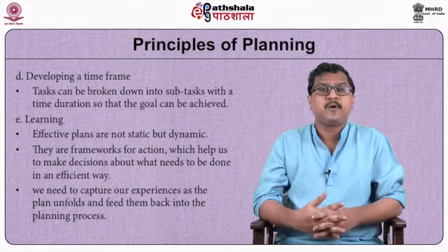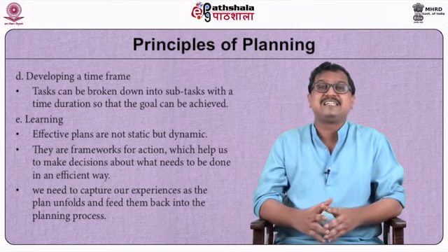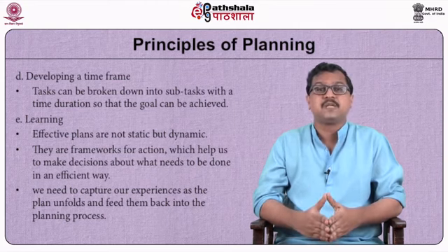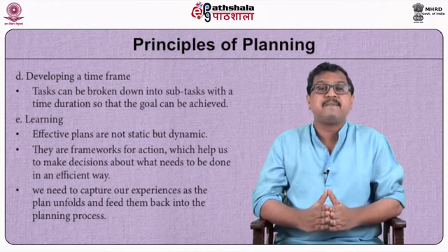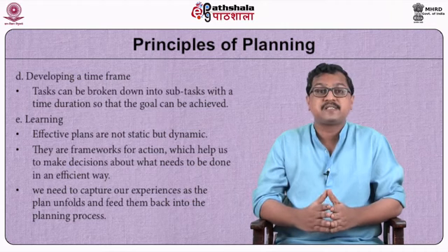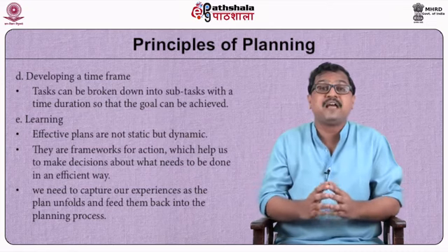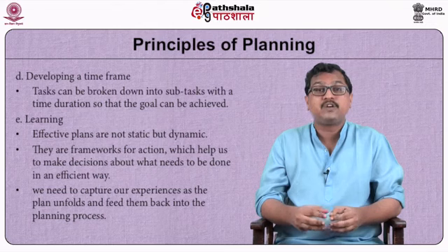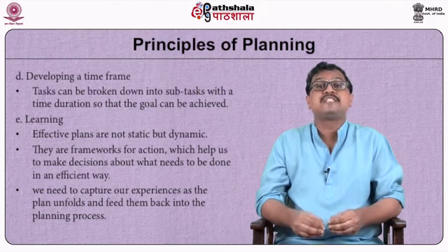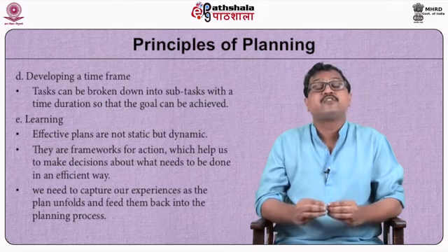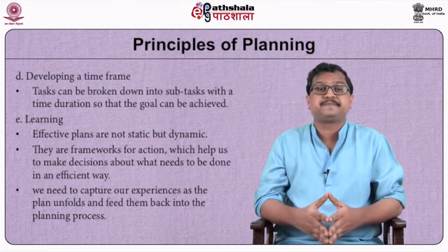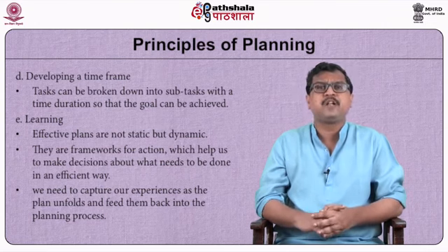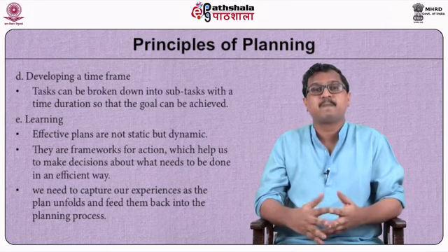The fourth important principle of planning is developing a time frame. Time frame is very important to achieve a plan. A plan cannot be an endless process. It is absolutely important for the plan to be within a particular period of time. Hence, the task has to be broken down into subtasks and the time duration for every such task should be clearly recorded.